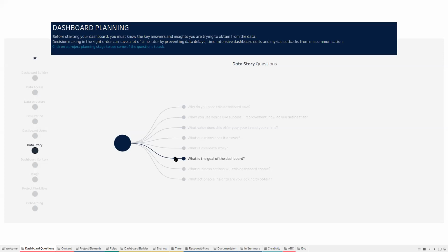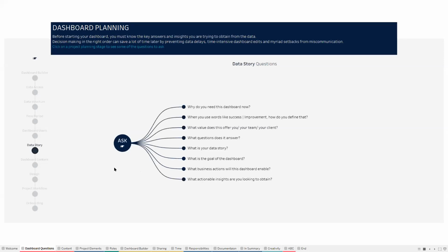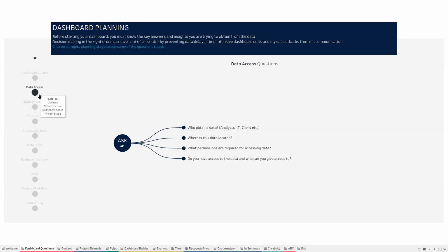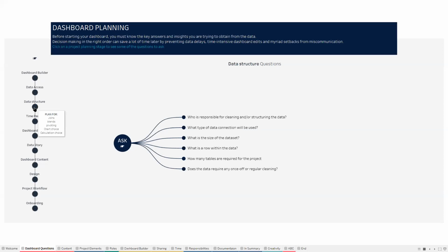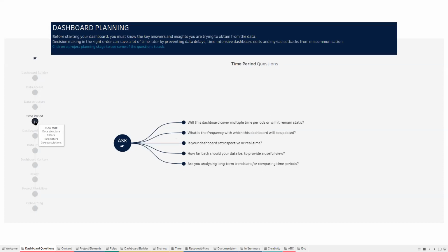And then they would say, oh, actually, it's something that we didn't specifically say, but it gives you more insight. So start by yourself, pick 5 core questions you think are essential to know at the beginning, especially something relating to the data structure, maybe, for example, time periods is probably the first thing you want to ask in the first meeting.